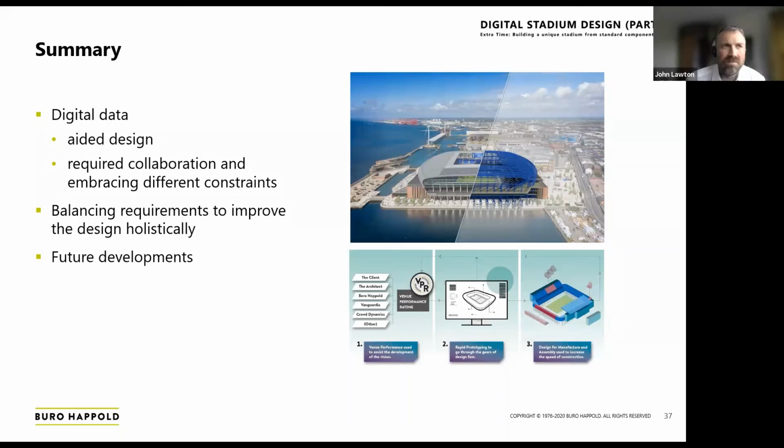Yeah, it's like an informed construction solution, isn't it? And what we're seeing is the time's still there, but we're taking the activity away from the site at the cold face into the factory conditions. So we can improve the quality of the products in that scenario, and you can manage how people go to work in a more controlled environment. So we do see the benefit that site time delivery is reduced, but we still have to produce the actual products in the factory. It's just transferring that for us, and we did see the benefit in the overall process of program and quality.